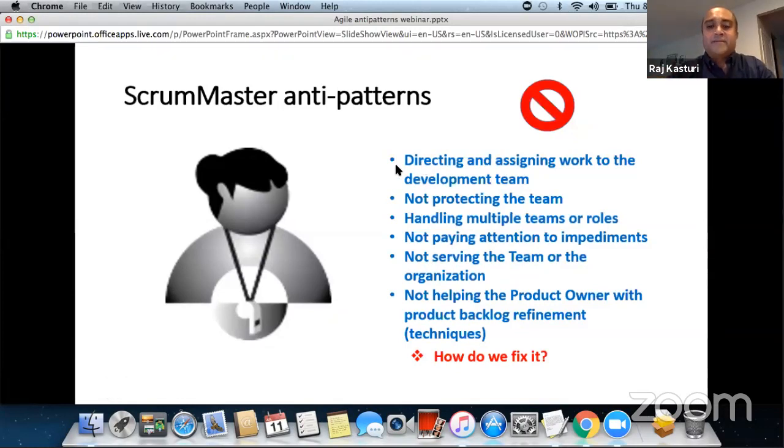The other thing that's important for a Scrum Master is that protecting the team is also about making sure the team doesn't get complacent. Using the same example, if this team has done 10 product backlog items last sprint, or maybe on average, and all of a sudden they try to take only 3 product backlog items, then there may be something wrong. So the Scrum Master needs to intervene, or at least mention to them, hey, make sure you don't become too complacent. This is important to find that balance between the teams.